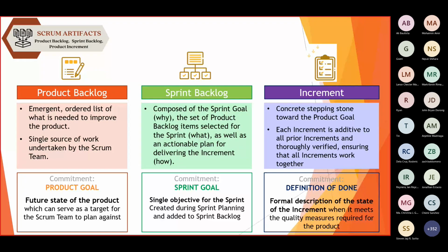All right. So if I was able to complete that living room, then the living room part of the house would then be part of my increment. Now, for example, for the second sprint, my living room was already done, and I've decided that I will work on the next one, which is the bathroom. So the bathroom would then be the next sprint goal. Assuming that I have completed it, my increment then would be not just the living room, but also the combination of the living room and the bathroom. Okay, so that's how the increment works, how it looks like.